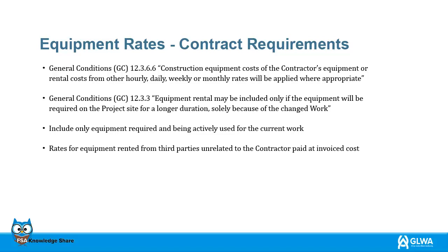General Conditions 12.3.3. Equipment rental may be included only if the equipment will be required on the project site for a longer duration, solely because of the changed work. Include only equipment required and being actively used for the current work. Rates for equipment rented from third parties unrelated to the contractor are paid at invoiced cost.